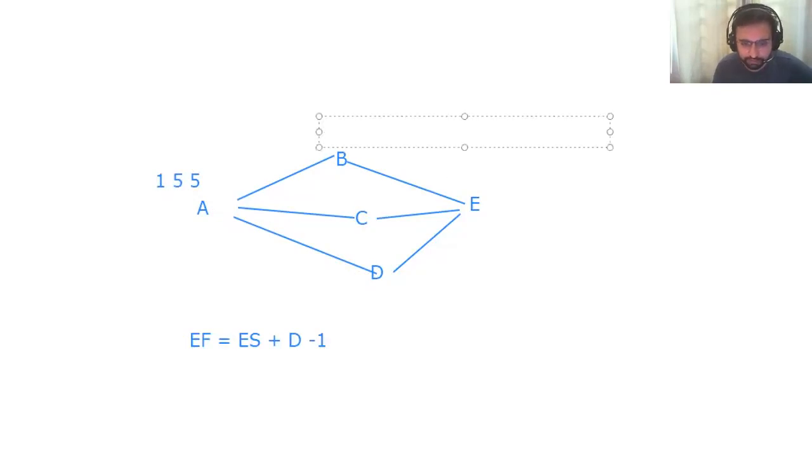So utilizing this formula, the duration of B was eight. Duration of B was eight, but we have six, eight. Using this formula, six plus eight, 14 minus one, 13.